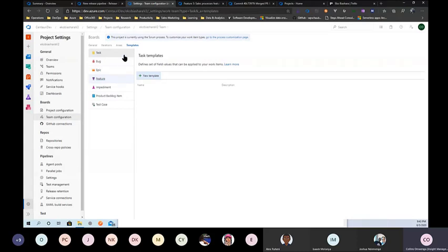If you've noticed, we haven't scheduled anything here. So you can say who is in charge of a specific epic, who is in charge of a specific feature. So you can put a team to be in charge of that. Product backlog item, same. But tasks, usually you assign it to an individual. So you come and manage that from this perspective.